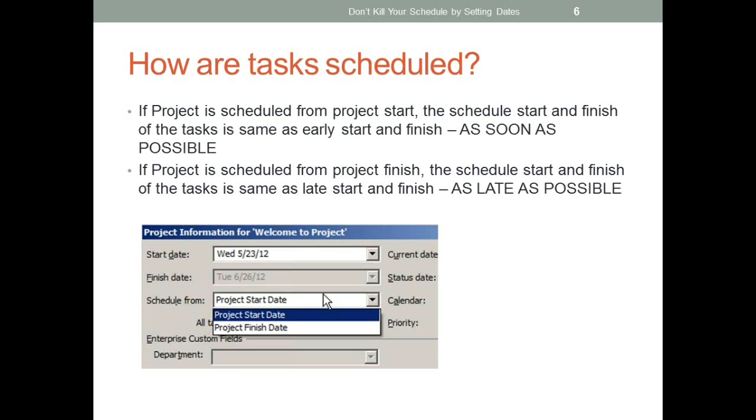Remember, when you go for forward scheduling, you need to know that your team will be busy every day, because all your activities are starting as soon as possible. You may not have any buffer time because the moment an activity completes, the next activity should start immediately. You are not taking advantage of any slack left.